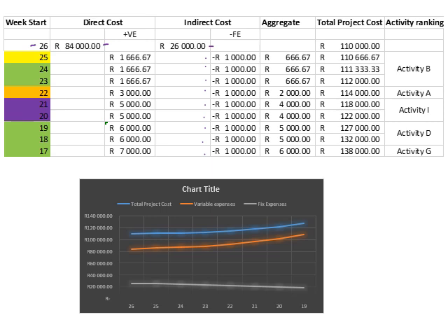Okay, and then our variable cost, what we do here is we take our items and we rank them as we would like to reduce each item with the least cost implication. So you would see our first ranked item is here, our second ranked item is A, and so forth. Okay, and then you basically just calculate the aggregate cost implication for the project.